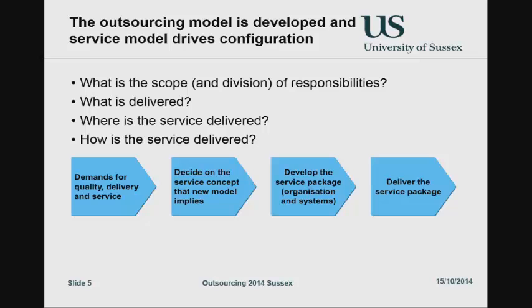And just as a case in point that dropped into my head there, for example, the Unilever Unisys particular contract, which I know something about. In that case, Unilever assumed that Unisys would be using the Unilever software to manage the service desk. This was not, let's say, properly communicated or understood by the supplier, who assumed that they would be using their own industry standard service desk software, in this case, to manage the contract. And so right up front, you have these situations about who is doing what.